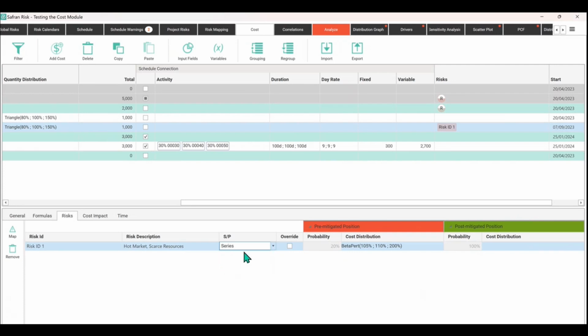So you can always use the override button here now and say, well, let's say the risk owner is Jeff, and Jeff is not in work, he's got COVID, and there's change management occurring, and you are aware of what's coming, and that the scenarios are changing, and so actually the likelihood is increased to 50%. Because actually we're going to need more specialists because the client has requested that we change the scope of the project midway through the project. So it's now gone to 50% or 100% or whatever it might be.